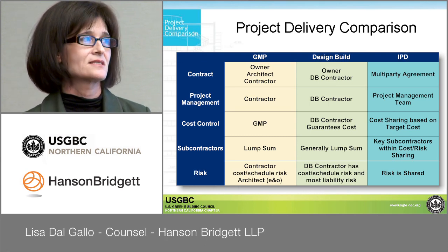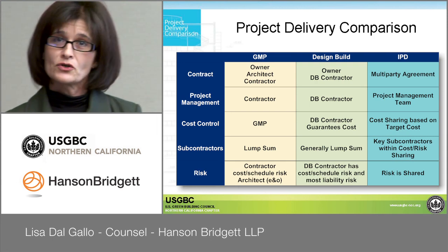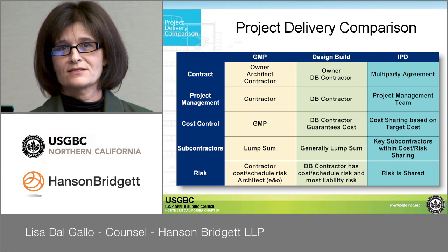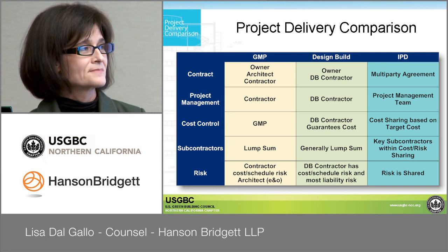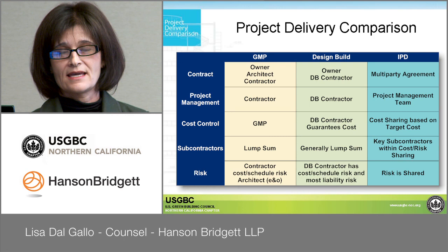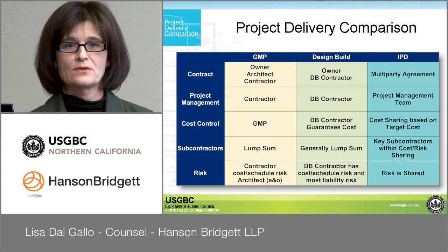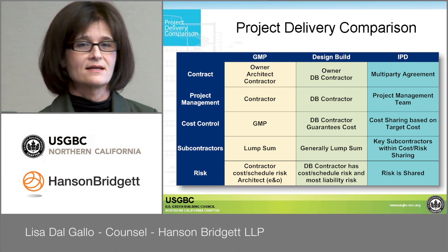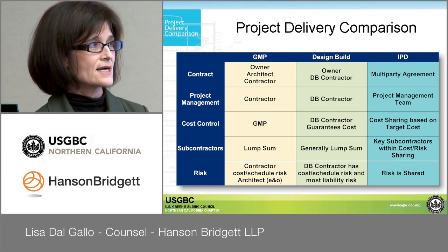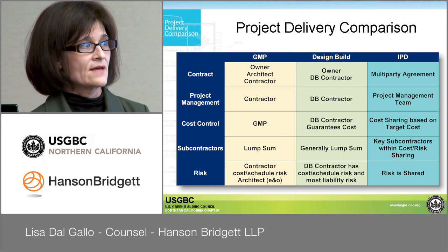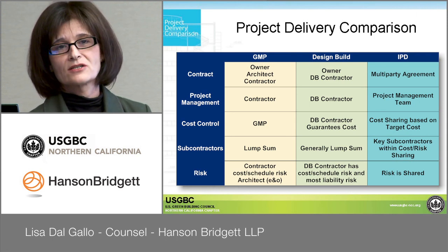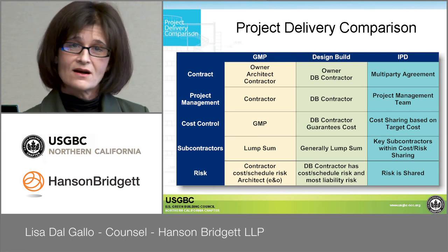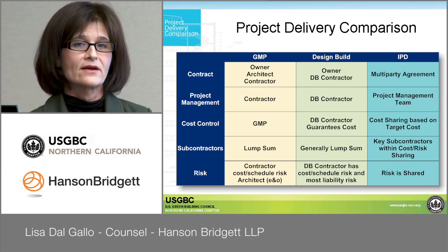Under the design build, it's a little bit better. You have an owner who's contracting with a design builder. Usually the contractor is in charge, and they subcontract with an architect or an engineering firm for the design. Sometimes people do joint venture, but typically that's the way it's done. And so the design build contractor manages the process and the construction, but they have their subcontracted architect or designer on board with them. They guarantee the cost and the schedule, usually, again, under this scenario.